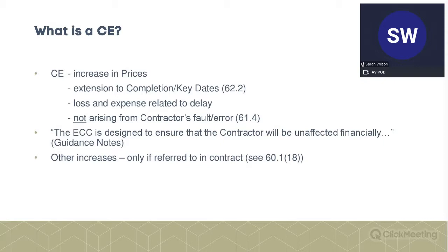Now, this quote is helpful to contractors and subcontractors, because what it's saying is that the NEC or ECC is designed to ensure that the contractor will be unaffected financially as a result of using the schedule of cost components or the shorter schedule of cost components.